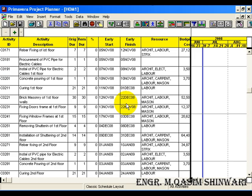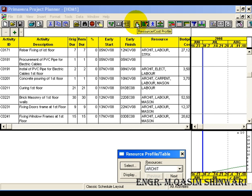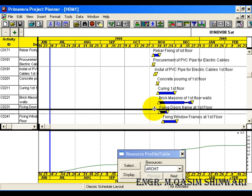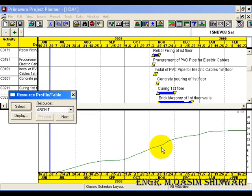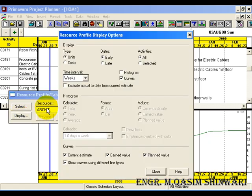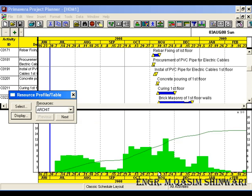For Resource or Cost Profile, click on the Resource Cost Profile icon. Here you can see the curve. There is no histogram present. To display histogram, click on Display and check the histogram checkbox. And click on Close.